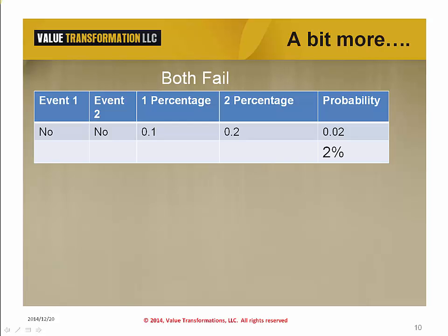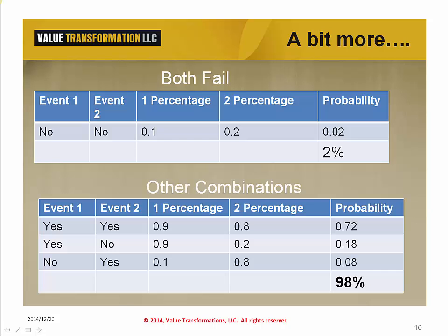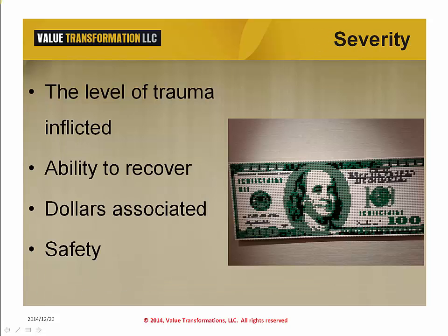To go a little further and not scare people too bad regarding probability and dependencies, let us look at it differently. There's a 2% probability that both tasks or events will fail. If we can accept any one task being okay, then the combination of tasks that we may find acceptable could be 98%. That includes the two successes and alternative of any one of the tasks being a success or failure.